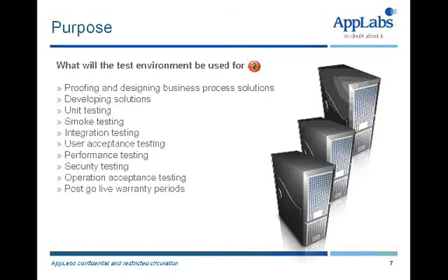Listed here are some examples of potential types of testing that could be carried out within your schedule. For example, do I need to smoke test my code deliverables? In volatile code delivery situations, it's often required to essentially pre-test any delivery prior to it being released to any test environment. This obviously alleviates the risk of the environment being down due to bad code.